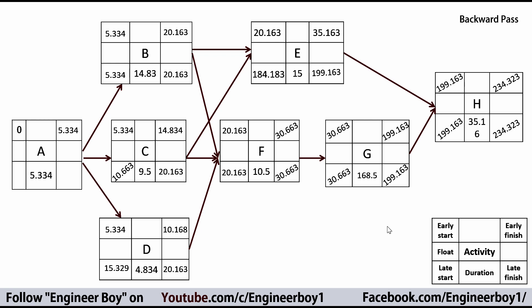Activity A is the predecessor for B, C, and D. Their late starts are: B = 5.334, C = 10.66, and D = 15.3-something. Since activity B has the minimum late start, we shift that to activity A and subtract its duration, giving a late start of zero — confirming the early start and late start of activity A are both zero.